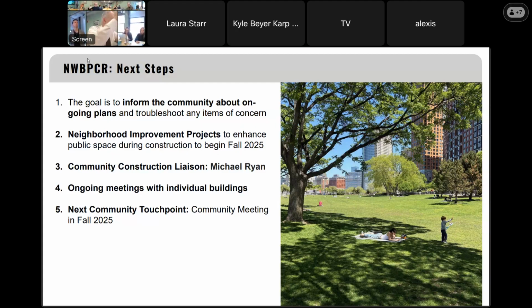The point of doing the test piles was to ensure that the assumptions we had made with the design about having the FPS where it is and supports weren't over-designed, that it wasn't under-designed. Right, I remember that. And net, what I've heard from the project team is the assumptions they made and how they designed it were appropriate. So we didn't overbuild it. We didn't over-design it. So confirmed it is what we thought it was.